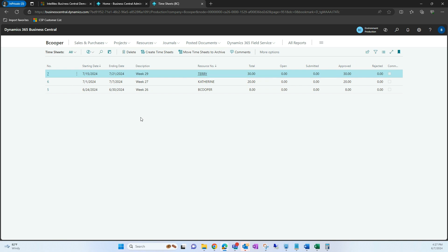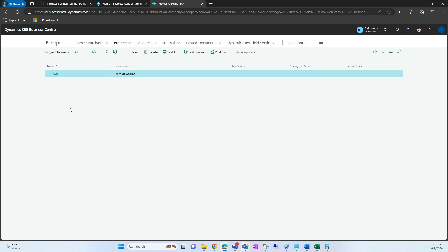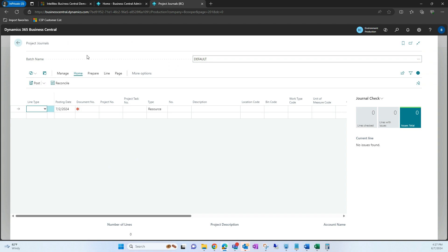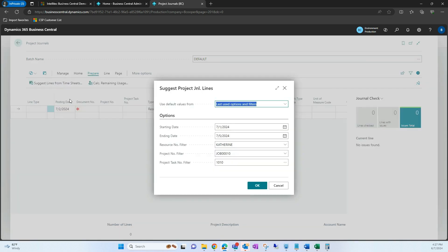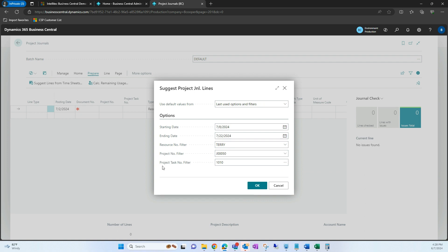Now once that timesheet has been approved, we're going to post the hours spent to that specific project. I'm going to go under Project and then go to Project Journals, and open this default one. We have the option to 'Suggest Lines from Timesheet Submitted.' I'll use this function — we can specify a starting date and ending date to pull anything within those filters. I'm going to filter my resource number to Terry, switch my job to Office Number One Remodel, and you also have the ability to focus on a specific project task — for now I'll leave that blank.